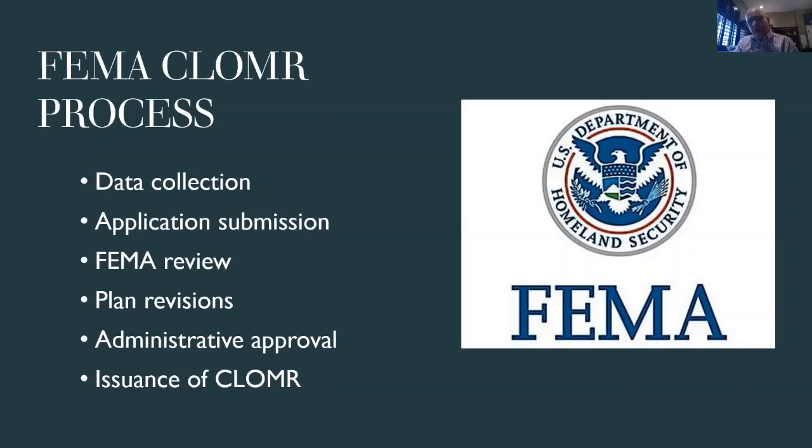Some of these projects, in my experience throughout the United States, all 50 states and the territories, take somewhere between 1 to 3 years, and in some cases even more, for consulting firms to put together. And when that is done, they have to provide this CLOMR application to communities, and then finally to FEMA, by completing several mandatory required application forms.